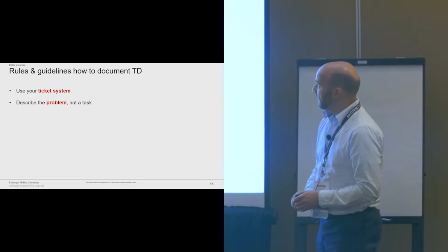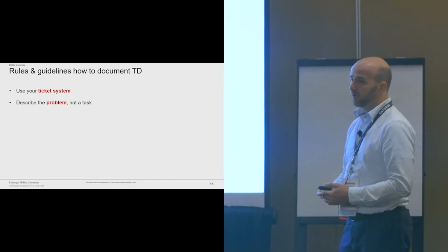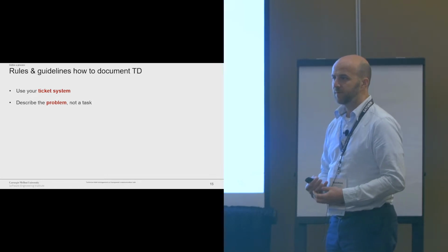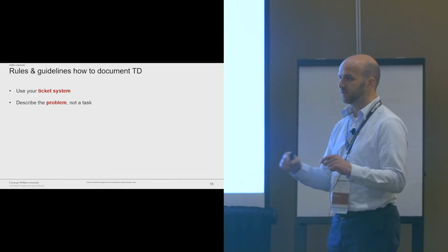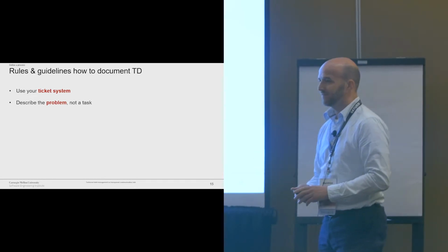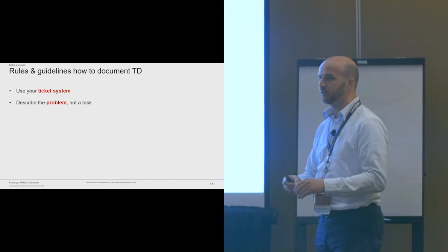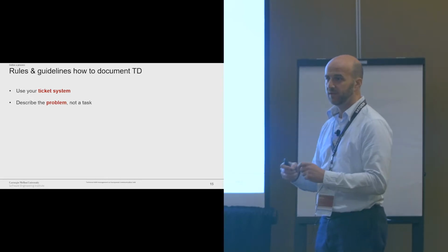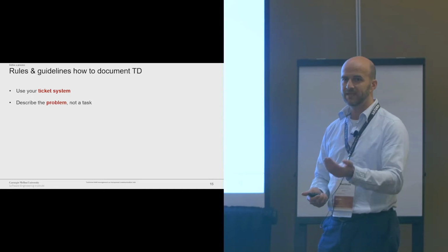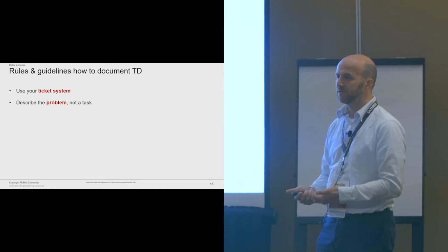The next rule or guideline is: describe the problem, not a task. What we saw was that many developers, when they start to document technical debt, document it as a task. We need to do this. We need to fix this. Whatever. In the communication with a product manager, it might make no sense for them.